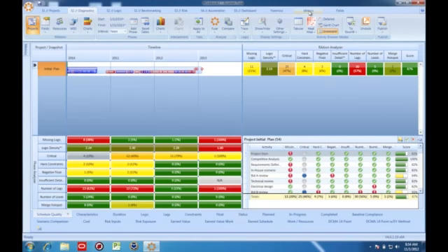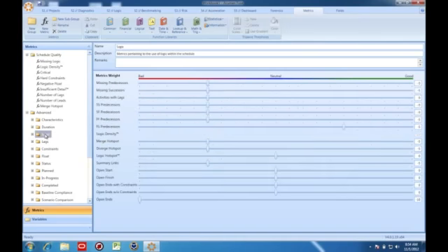Let's relook at metric weighting with respect to the metric-based scoring method. The sliders can be used to adjust the weighting from bad to good, and you'll see here that as I move the slider, the overall weight assigned to each metric appears as a numerical value on the right-hand side of the screen. Note that the finish to start predecessor's metric is good, while the other metrics are rated as either neutral or bad. For each condition that the metric meets, it's going to accumulate the point value assigned to the weight, whether the point value is negative or positive. The system adds these values and it normalizes them on a scale of 0 to 100, and this is what determines that individual score per activity, which we can see over on this screen.